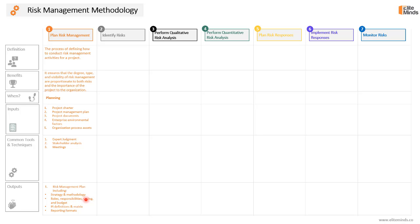The risk management plan includes the strategy and methodology we will be using for project risk management, roles, responsibilities, timing and budget of risk management activities, the probability and impact definitions, the probability and impact matrix, and reporting formats. These are the key sections of the risk management plan.